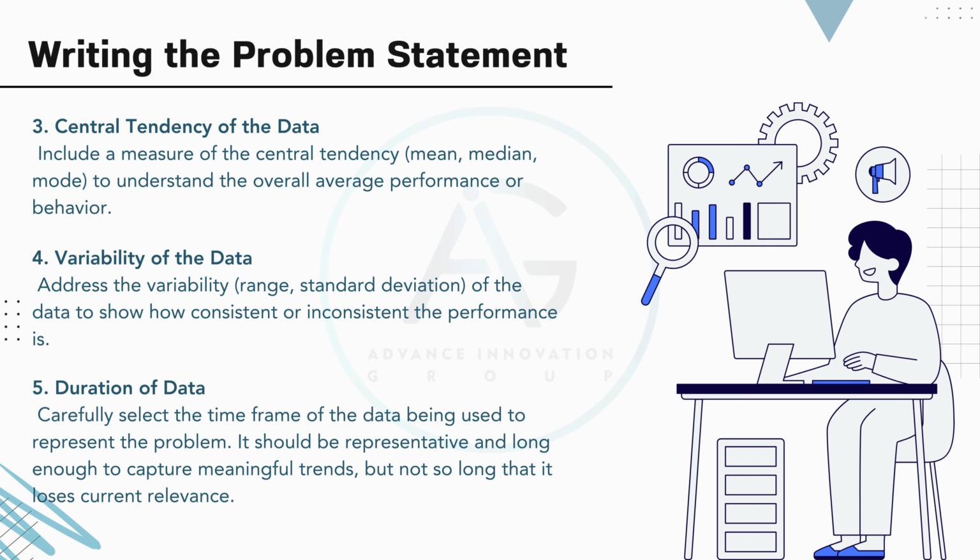5. Duration of data. Choosing the right time frame for data is crucial. The data should be recent and long enough to show meaningful trends, but not so extended that it becomes outdated. For example, using 12 months of hiring data strikes a good balance, capturing seasonal effects and long-term trends without losing relevance to the current situation. Including these elements makes the problem statement more robust and credible, helping stakeholders fully understand the scope and nature of